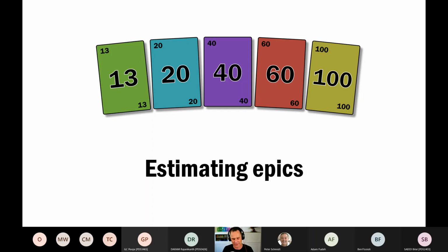We could do exactly the same thing with our requirements. Instead of estimating them in hours or days, because developers go at different speeds, we can estimate them using story points, which is just like kilometers. And we can add in a little bit of a factor to anticipate any risk. So if we have a requirement to use Azure Service Bus for the first time, or we're going to be working with function locations and asset trees and Dynamics 365 Field Service, and we've never done that before, or we're going to be relying on Adobe to help us integrate with Adobe Campaign, and there's a dependency there that might give us some risk, then we can adjust our estimates accordingly.